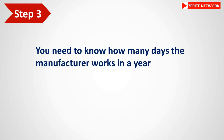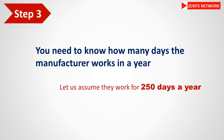Next, you need to know how many days the manufacturer works in a year. This is simple logic — you don't want to include their days off as part of your lead time. Let's assume they work for 250 days in a year. This is information you can simply ask the manufacturer and they'll tell you.